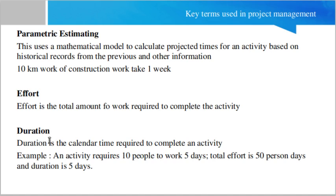Next, Effort is the total amount of work required to complete an activity. Duration is the calendar time required to complete an activity. For example, if an activity requires 10 people to work for 5 days, the total effort is 50 person-days and the duration is 5 days.